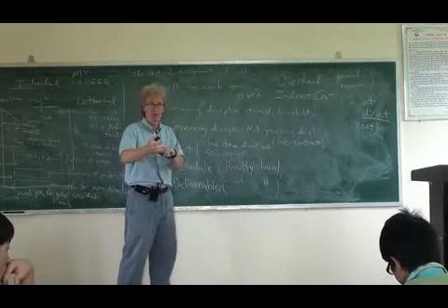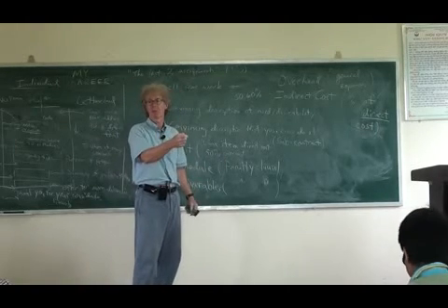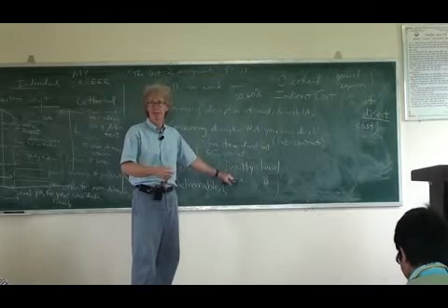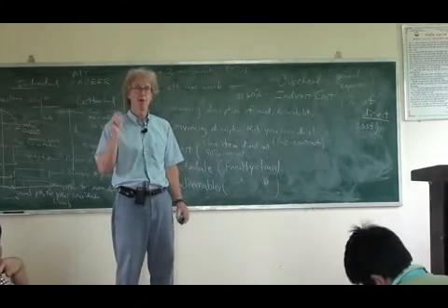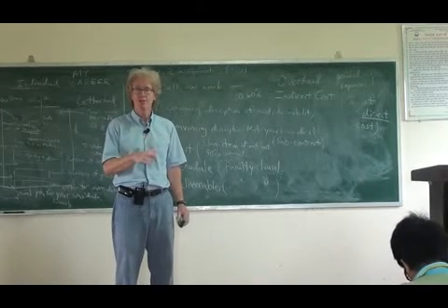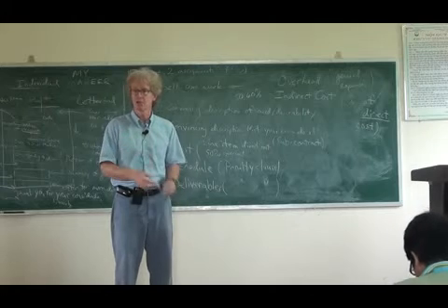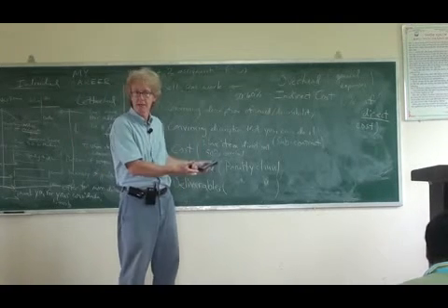Right? So some explanation. The next line could be travel expenses to go meet the experts in Ho Chi Minh City. Reasonable travel expense. Go look up the airfare, look at the airlines, look up a reasonable hotel cost, put in a reasonable food cost if you have to eat in restaurants in Ho Chi Minh City. For how many days you're there, add up all those days, that's a new line item.